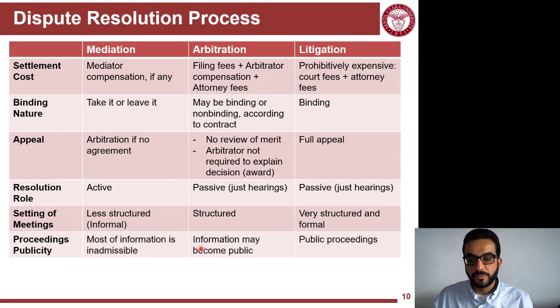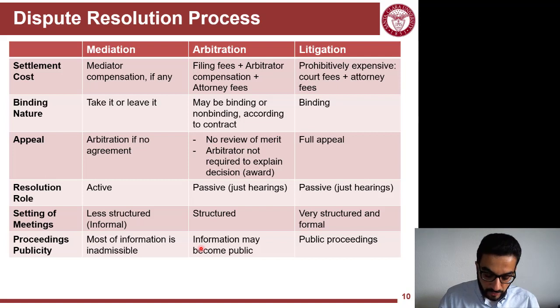And then the openness of the proceedings, the documentation. For mediation, it's private. Arbitration here is private, but it can be public if you're dealing with a public project. And finally, courts. You can have access to all court proceedings and case analysis and all of that. It's publicly available. The idea here is common law or precedent law, sorry, that when a court makes a decision about a case, that decision is considered in future cases. So that's the purpose here. You need to make everything public.